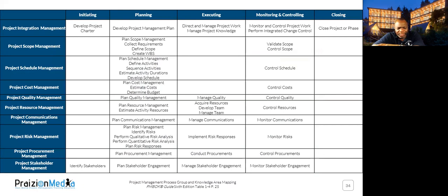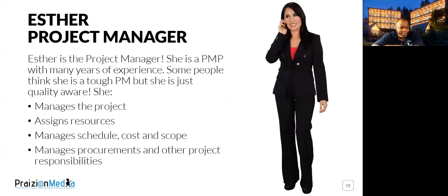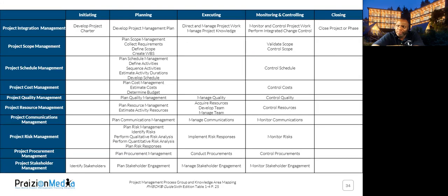He wanted to add all these bells and whistles and fancy features to the website. So he jumps into the conference room and begins narrating what he wanted to see as changes. But the project manager shut him down. Esther shut him down because Esther said, there's absolutely no reason for us to add more. That's gold plated. This isn't what the customer asked for. This is what you want. And no, you are the sponsor, but no. And that was control scope in action, okay?